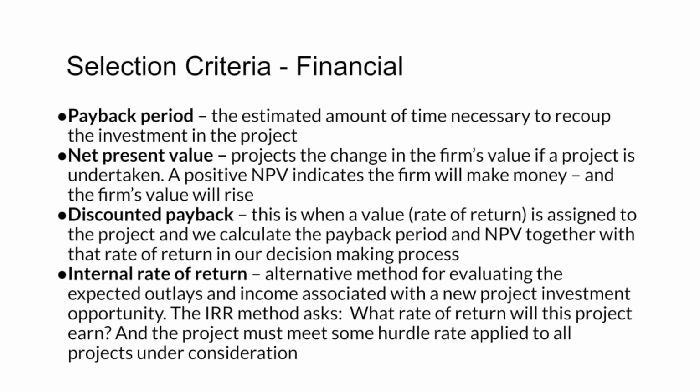Discounted payback is very similar to that, where we say, okay, here are all the payments. Let's discount it back to the present and say, is this more than what we're going to invest in the project? And the internal rate of return is analogous to the interest rate. The amount of money the project makes as it moves along, is it enough to generate a reasonable return that we could get relative to any other project we do? Is the return greater?